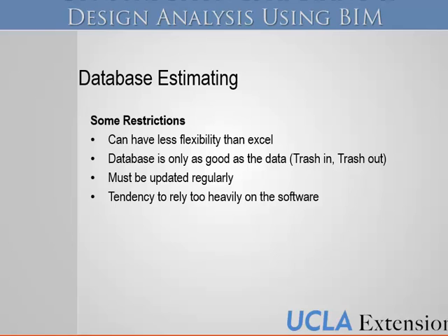So yeah, we're still figuring out just that. Who's going to do that? How often is it going to be? And what's the process? For our initial update, our idea is that we'll just export the entire list of all our items, which is thousands of items, and then send it around to all our lead estimators and have them put their 2 cents in at what they think the current unit prices are. And then that's the initial update, and then it's just kind of tweaking it from there. But yeah, it can be a huge job.